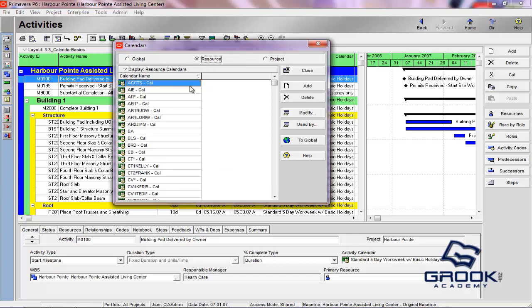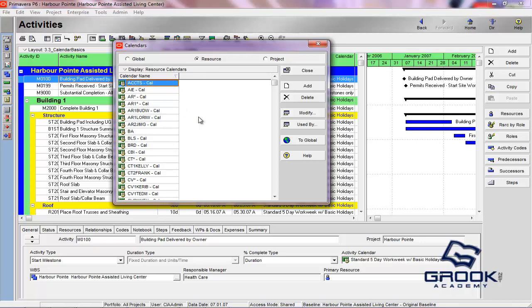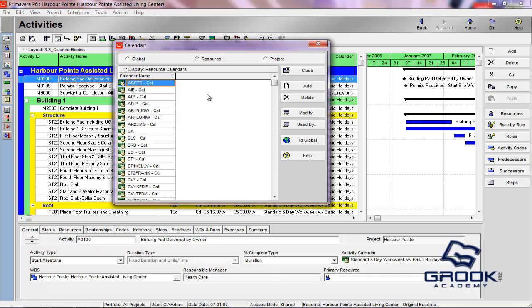Now Resource Calendars are going to be calendars that are specific to all the resources that you utilize in your project. So let's say you have a group of carpenters, and these carpenters do not work on Friday. You would be able to make their work week be Sunday through Thursday as their five-day work week. You can also set the number of hours they'll work in a day. You can do all of that here, and it's basically determining your resources' availability for work.